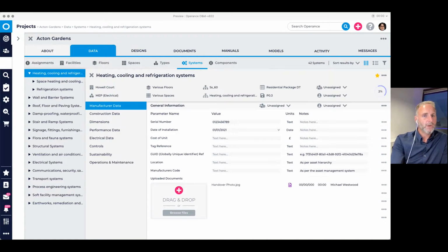But that's not all. Why employ external coordinators to pull in all this information together to then create the various handover documents? O&M, health and safety, building user guide, all those. Why do that when it can be done automatically? Especially when a lot of handover information is simply duplicated between each manual or file. For instance, we see as-built drawings requested in both the O&M and the health and safety file. And we see contradictory project descriptions written about the same project across several different manuals and files.